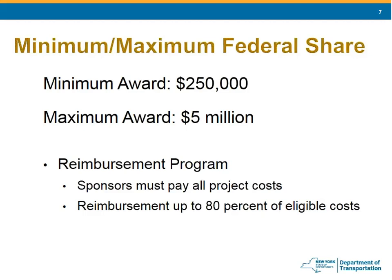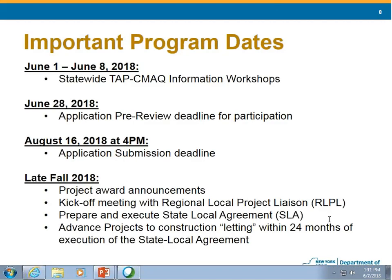There are other ways to provide the local match. CHIPS funding is one option — if you're doing some work, you can use CHIPS for that. There's also some in-kind work, but that needs to be pre-approved by NYSDOT to be acceptable. In the 2016 round, SAM funding was allowed to be used as the match. We believe it still is, but let's get back to that. We have frequently asked questions posted on the website — about six pages are up there now.